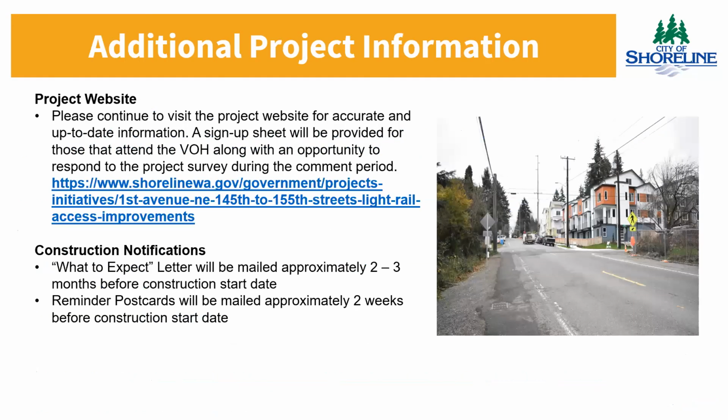So for some additional information, please continue to view the project website. As far as construction notifications, a what-to-expect letter will be mailed approximately 2 to 3 months before the construction start date, and reminder postcards will be mailed approximately 2 weeks before the construction start date.